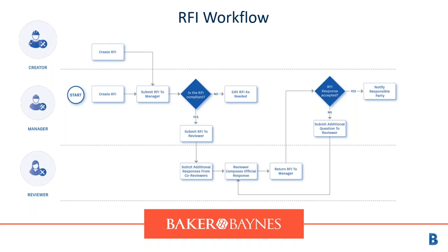That RFI has a compliance check. So we can say, is that RFI good? No, it's not, go and edit it. Give me all the information that I need. Or is that RFI compliant? Yes, it is. If that RFI is compliant, it gets submitted to the reviewer.